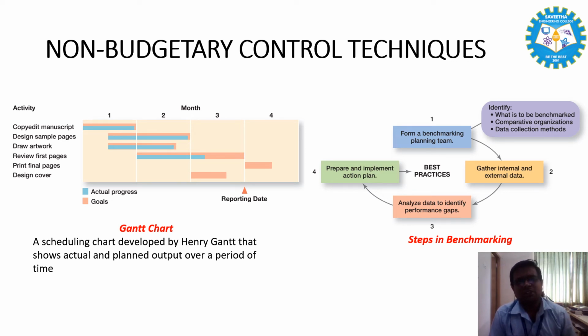The major limitation of Gantt charts is that projects are often considerably too complex to be communicated effectively with a Gantt chart. The chart does not represent the size of a project or the relative size of the work elements. Therefore, the magnitude of a behind-schedule condition is easily miscommunicated. If two projects are the same number of days behind schedule, the large project has a larger impact on resource utilization, yet the Gantt chart does not represent this difference.